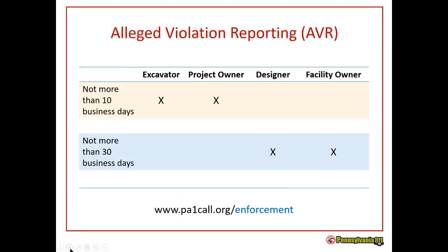So for filing an alleged violation report, if you're the excavator or project owner, you have not more than 10 business days. And if you're the designer or facility owner, you have not more than 30 business days. And just a little aside, if you should ever receive a letter from the PUC, Public Utility Commission, telling you to submit a report, please make sure that you do.